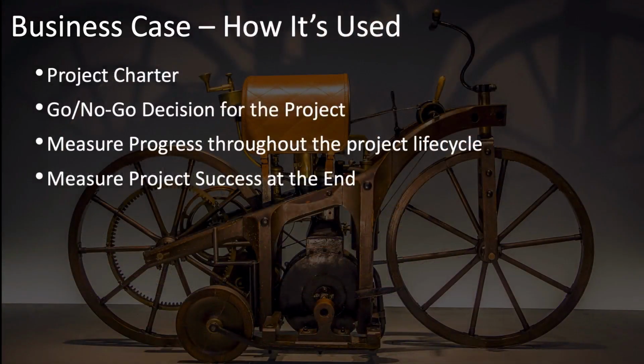How is the business case used? The business case is a key document. It's the culmination of the pre-initiating work that's done to decide whether or not to proceed with the project. It not only determines whether to start work on the project charter, but also provides some of the key information to be included in it. The business case is not something that's put on the shelf and forgotten once the project charter is underway. The business case should be reviewed throughout the project to ensure that the project remains aligned with it. It's the sponsor's job to do this.